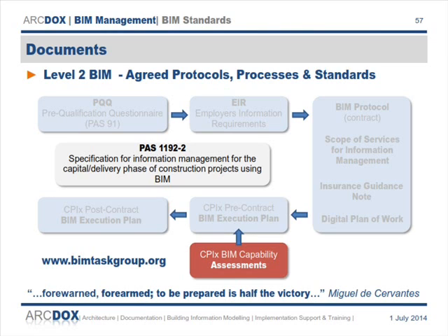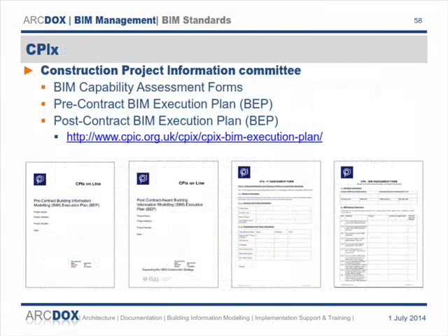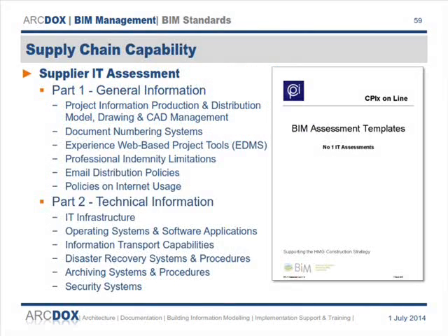So there's a number of templates produced by CPICs, and again, if you Google CPICs, you'll find them, which go out with the tender documents, asking the contractor to complete these. They should actually go out with the designers' appointments as well, so the designers can determine their BIM capability as well. But they're primarily being used at tender stage for the contractor. And there's a number of templates out there.